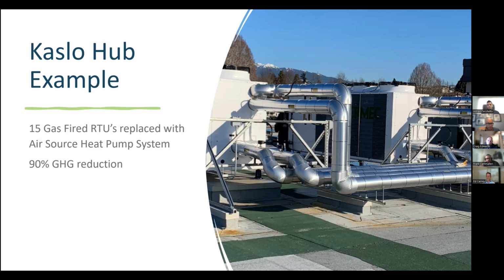Yeah, so for any retrofit project, we do a feasibility study and an economic analysis. But we have such aggressive targets for reducing greenhouse gas emissions that we have an internal carbon pricing policy that we developed about 5 years ago. We've set internally a price on carbon. It started out in 2018 at $150 a ton, and it raises by, I think, 6% per year. So now it's up to about $170 or $175 a ton. And we include that in the economic analysis, so it helps tremendously with the business case.